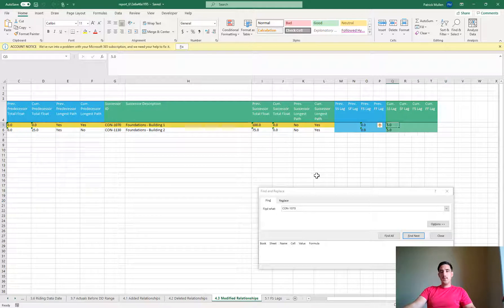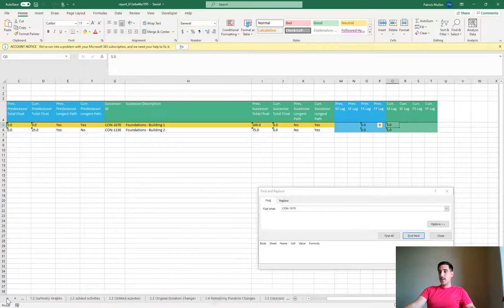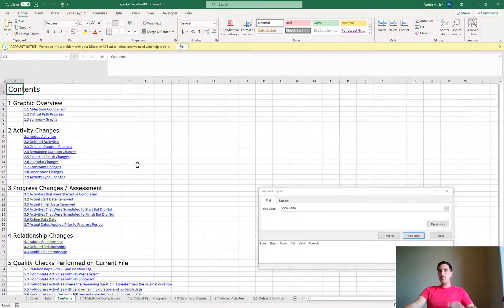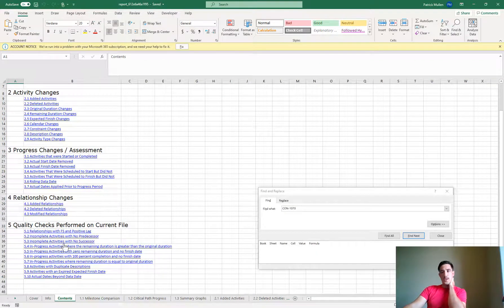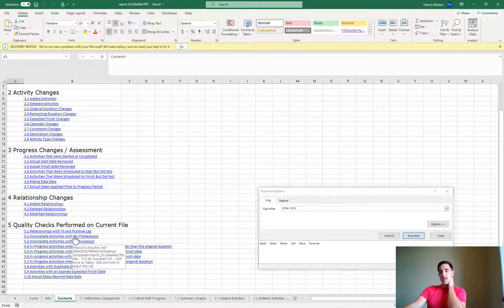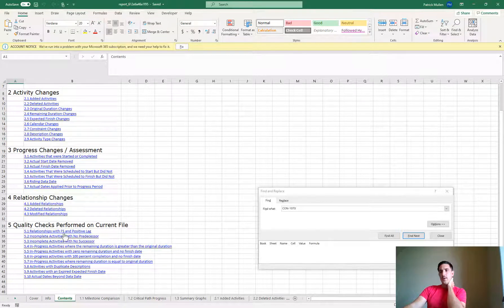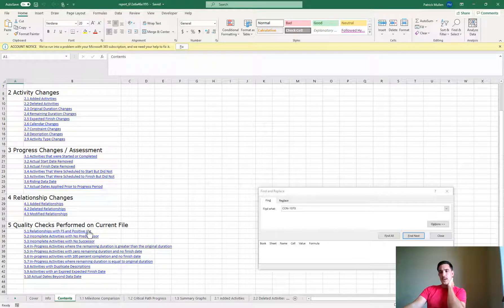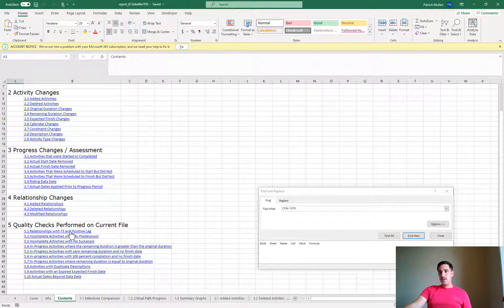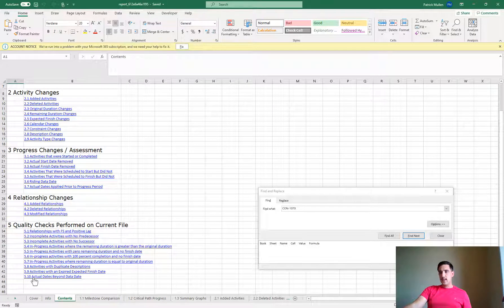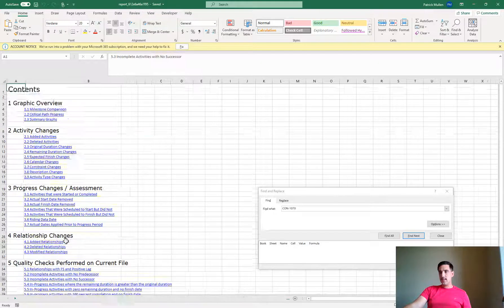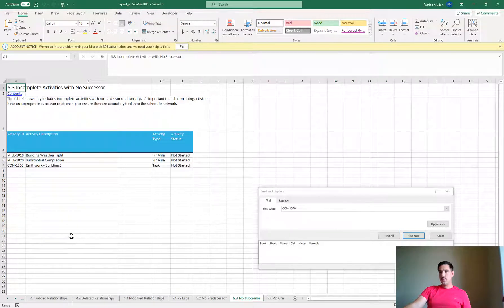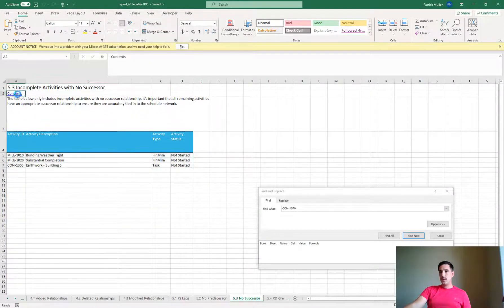If I go to the table of contents as well, there's some quality checks that are included in the Excel version. Some of them are included in the free version as well. Relationships with finish to start and positive lags, activities with no successor relationships, so there's a few of those items. I can go back to the table of contents, no predecessors, looks like we're clean there.